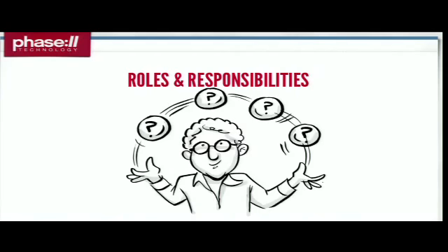The key to doing that is upfront being very, very critically clear on what everybody's doing. A set of bullets under each person's name that says, I am this on the project, these are my responsibilities, this is how I will be judged in terms of success on this project, is very, very important. And another key aspect of that is making sure that there's a good understanding between the stakeholders or the people on the project with those roles and responsibilities, what their deliverables are to each other.